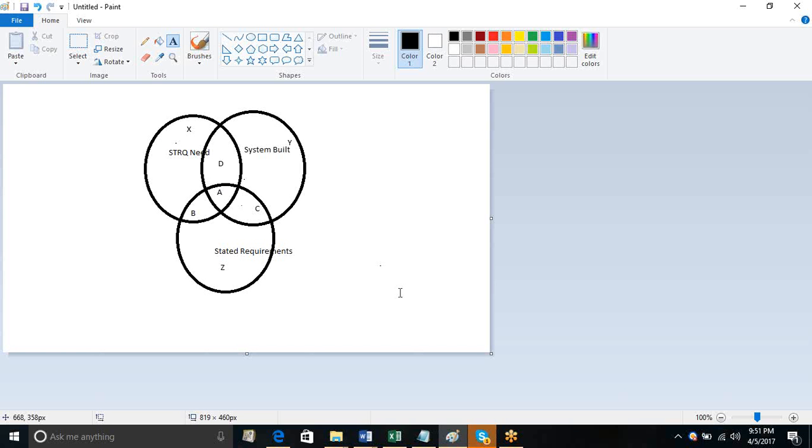So the key aspect is he may come back and say, your executive sponsor is not mine. I understand you want this requirement, now you go talk to your executive sponsor, right? This happens a lot in the real world, guys. That's when you would explain all of this and add it to the next iteration, if everybody's on board. If not, you would negotiate the timeline and set a new timeline in stone.